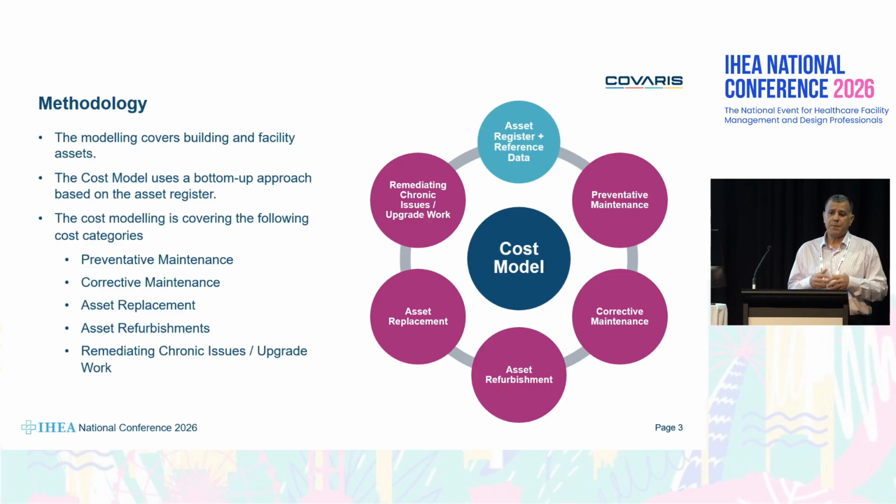Then each asset has an expected life. We want to run this building up to 2040 or 2045, but that chiller is end of life and has to be replaced in 5 years' time. So what needs to be replaced? Some of the complex assets also last for 20 years, but at some stage you need to spend some money and refurbish them, make them reliable and to the service level that is expected from the assets.